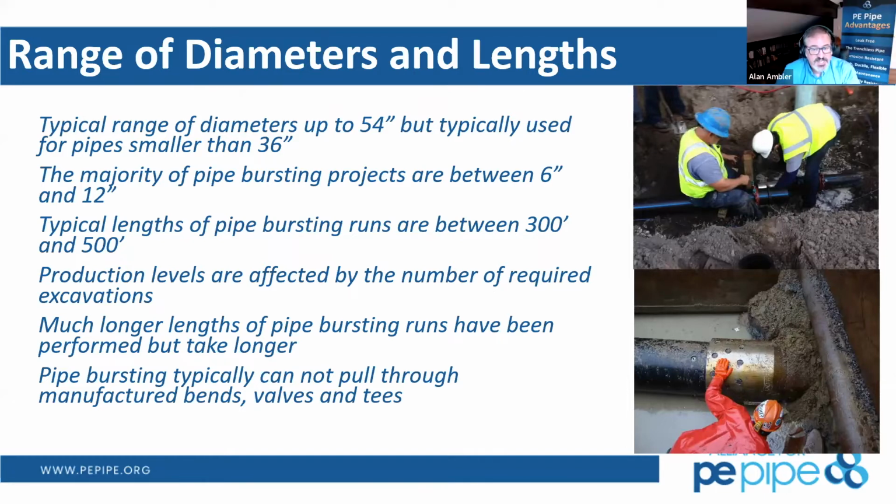So static itself allows you to seal the inside of the pipeline for disinfection purposes. We'll talk a little bit about pre-chlorinated pipe bursting here in a minute, and I'll walk through the whole process. Because we do not have an air compressor hose or an air hose through the inside of the pipe, we can maintain disinfection through there.